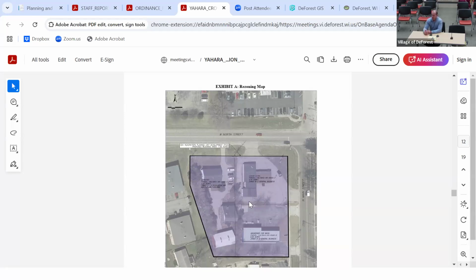But we did issue a finding of no significant impact as part of that assessment. And right now, this Friday, there'll be the published notice of that finding of no significant impact, FONSI. And then there's a 15-day comment period, and then we'll submit that to HUD for review. So it sounds to me like after we get the FONSI and all of that, we should be good to go. We don't need the EPA or anything like that to come in, since it is technically cleaned up. No, that's true.